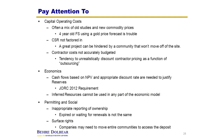From the economics perspective, it's about looking at the NPV and ensuring the appropriate discount rate has been used. But importantly, when someone presents a project and its economics, there's a tendency to slip in inferred resources as part of that valuation and calculation. Although it can be done for illustrative purposes, it has no basis for valuation. Inferred resources don't necessarily mean they will become measured or even become a reserve. On the permitting side, Indonesia has a complex IUP system and complex ownership structure — in many cases you don't really know what the ownership status is until the end, which is the last thing you want.